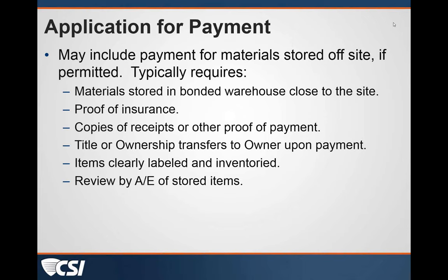Also, you might want to caution your owner about agreeing to make materials stored off-site that are in another state. That opens a whole other can of worms in terms of priorities and who can get access to stuff if it's not within the state that the project is in. If the owner's in, trying to reach across state lines and get property in case of a default is next to impossible.